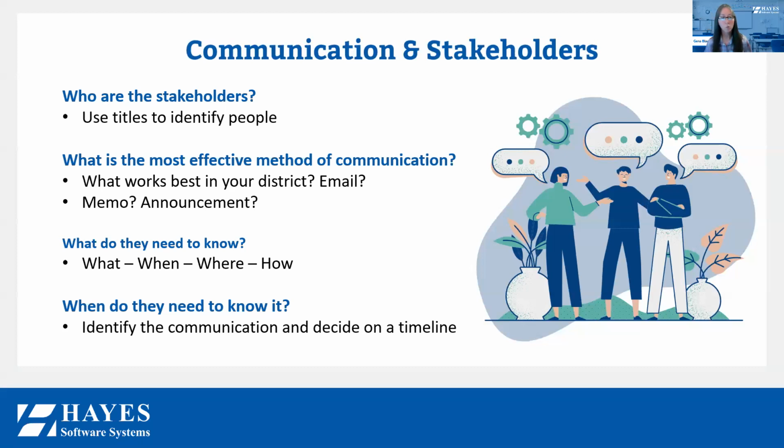So we need to identify on a really nice, clear timeline exactly what we're going to do and when we're going to do it, so that everybody's in control. So when's that first communication go out? When does the supporting communication for that one go out? When does that first communication go to the teachers? When do we support that with a secondary backup and those sorts of things? It's all part of writing that plan.